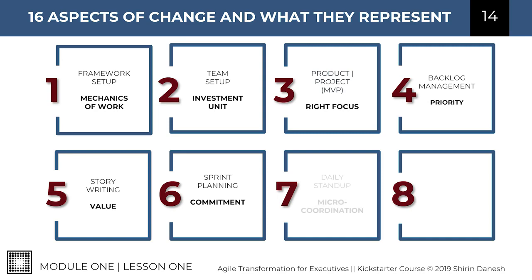Next one is about daily stand-up. You've seen it so many times. You know what I'm talking about, but my call out to you is about something that people don't talk about that often, and that's it: stand-up is not a status report. It is of the nature of micro-coordination. When people come together in the morning, I say, I'm going to be working on this. Another person will say, I'm going to be working on this. Is there anything that we need to coordinate with each other? Do you want me to do anything? And that's how they design their day together.